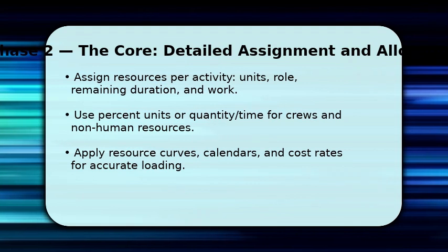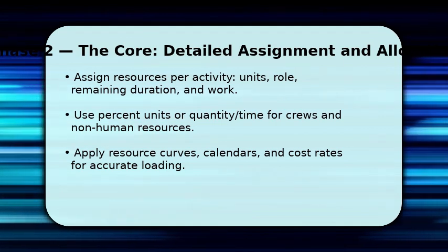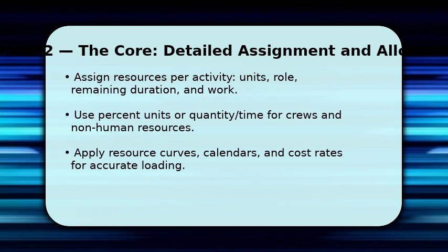Apply resource curves where effort varies, and ensure each resource uses the proper calendar and cost rate so the system shows realistic loading. Once assignments are in place, review the resource usage spreadsheet to validate distribution and totals.